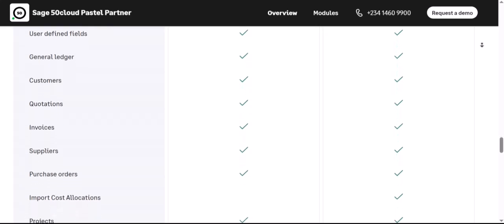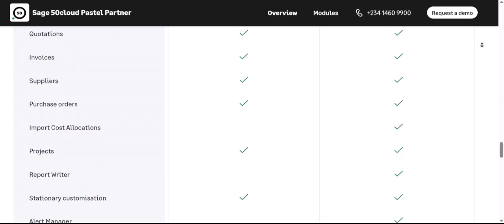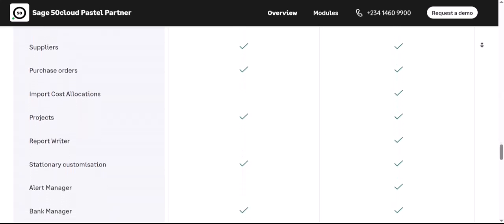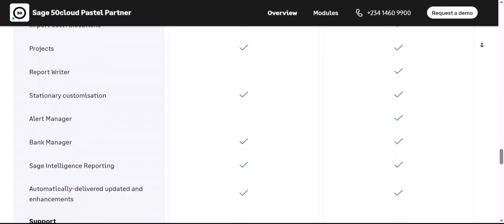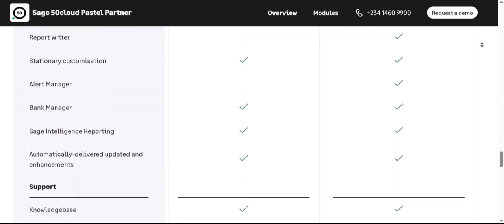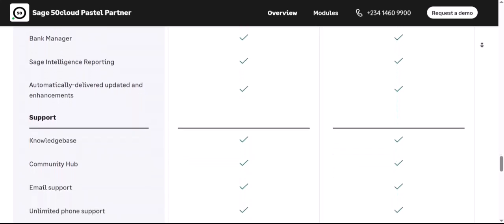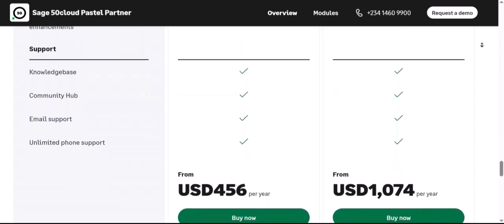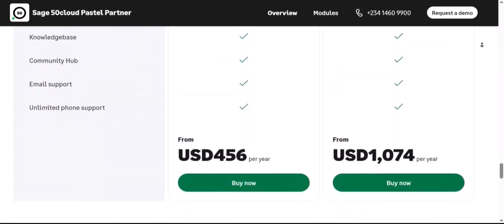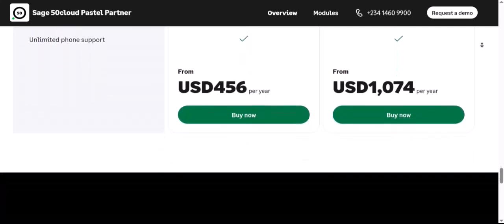For instance, a project manager could run a report to see the actual labor costs incurred on a specific phase of a project compared to the budgeted amount. If there's a significant variance, they can investigate the reasons behind it and take corrective actions, such as reallocating resources or adjusting the project schedule. Similarly, financial teams can use project profitability reports to identify the most and least profitable types of projects, informing future business strategies and pricing decisions.